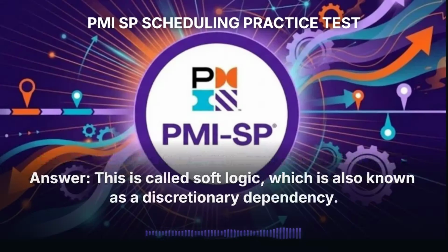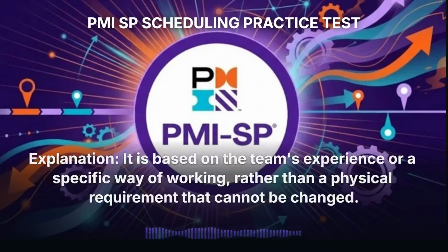This is called soft logic, which is also known as a discretionary dependency. It is based on the team's experience or a specific way of working, rather than a physical requirement that cannot be changed.